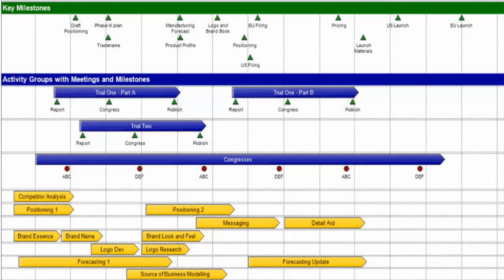Jack did not keep up with the Gantt chart, so was unaware that software testing was behind until it was past due. Programming problems in the software were not caught early enough, which in turn caused 3 modules in the design training materials to be incorrect. Jack was reactive instead of proactive.